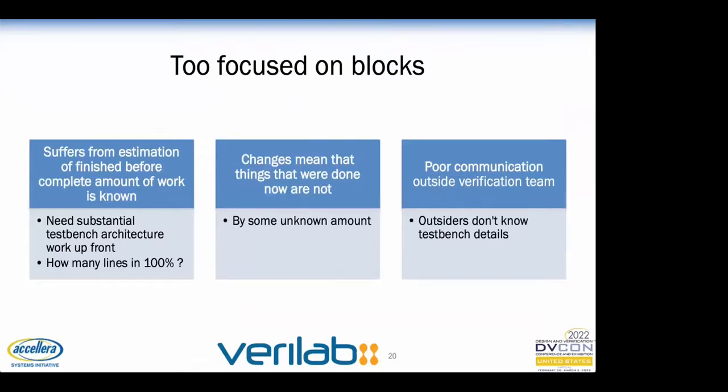Another failure mode is to start building the test bench architecture in detail and then estimating how long each of the test bench blocks will take to implement. This can work much better, but introduces the extra step of needing a detailed architecture of the test bench before scheduling can begin. If the team has finalized specifications that aren't likely to change, this can work just fine. If things aren't finalized, then working out architectural problems very early in the process requires knowledge of the DUT that the team doesn't have yet.